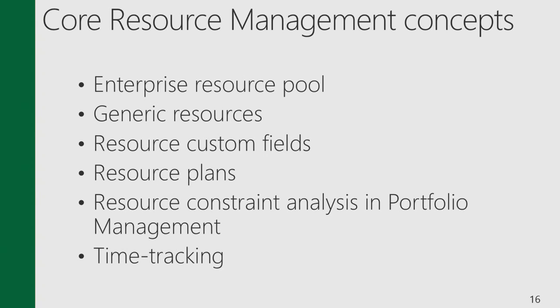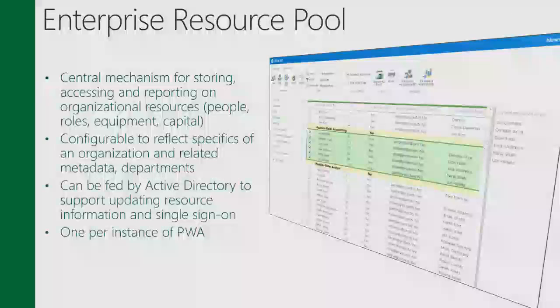One of the first things that is important, and is actually one of the main reasons people decide to deploy a PPM solution, is to have everybody in the same system, to have a common repository for resources. This is what we call the enterprise resource pool in Project Online and Project Server. To avoid using local resources like we have in Project today, when we have separate files across network shares and stuff like this. So with an online solution or a server solution, you have all your resources in the same database. We provide options to sync that with some AD groups,